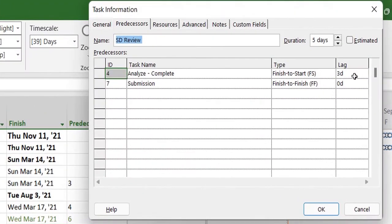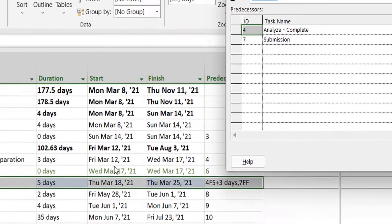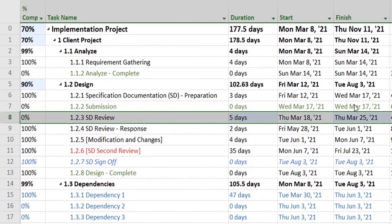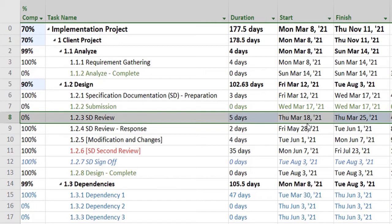Task 8 is dependent on task 4 with the relationship of finish-to-start and 3 days lag. So finish-to-start means this will finish on the 17th and 8 will start on the 18th. Sorry, this will finish on Sunday on the 14th, and this will start 3 days after that, so it has given that lag.